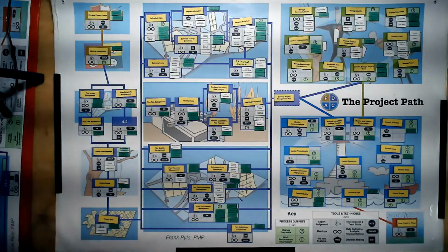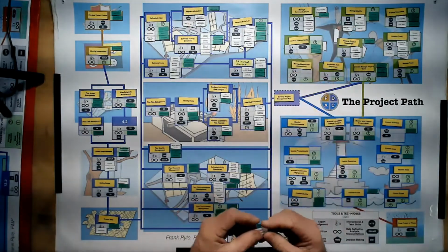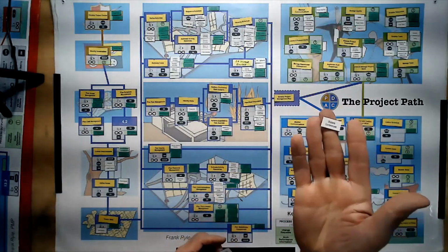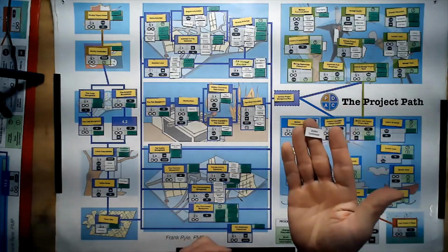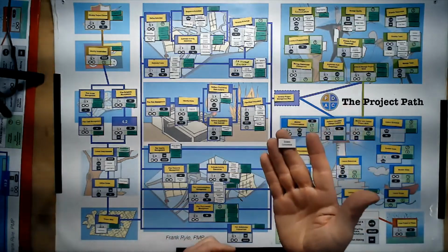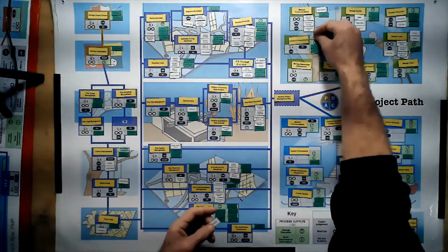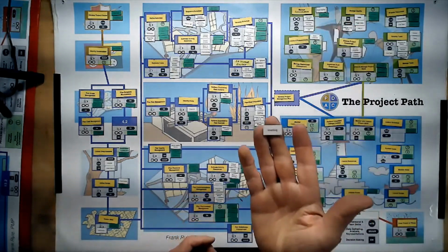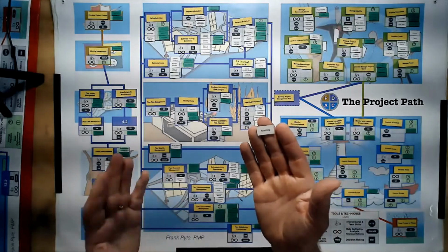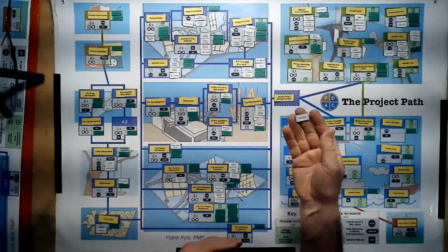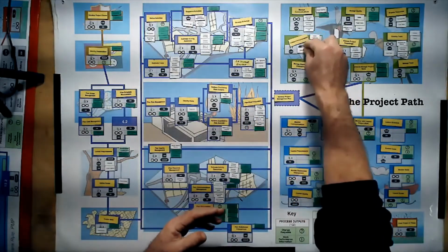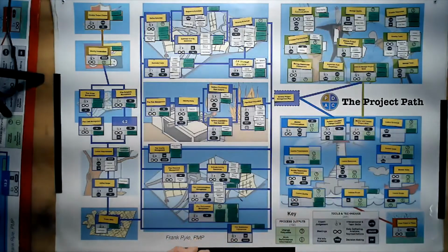Now we can see here that in conducted procurements, we have the bidders conferences, which is a great way to do it. Sometimes it's mandatory that you do this. The point of the bidders conference is that there's fairness between the people bidding for the work. So that should be something here. And then also advertising to make sure that we get the right people and enough people in to have a competitive bid. So that's the idea of conducting the procurements.